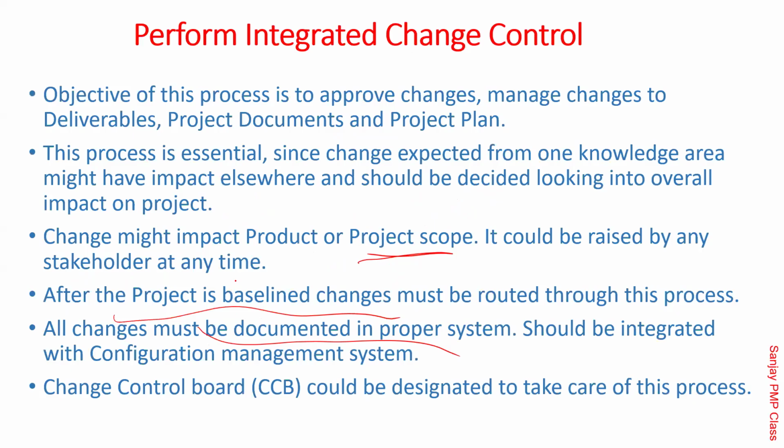If someone tries to take it again, the system says no, don't change anything, Shishir is working on that. Shishir will make the change. So V 2.0 he took and made the changes. When it comes back, it will be checked in as V 3.0. That's called a check-in. These are configuration management related words.